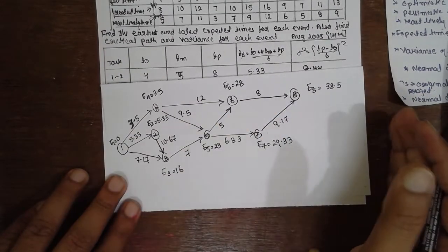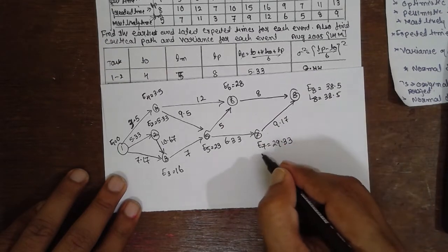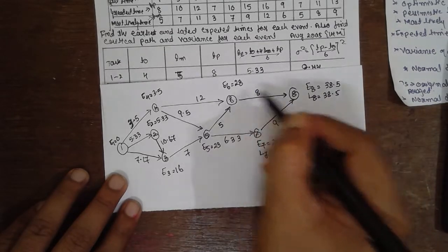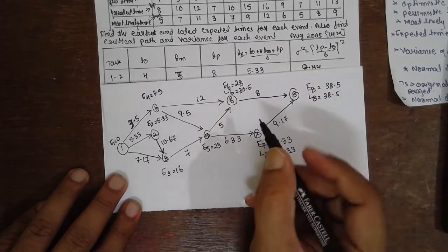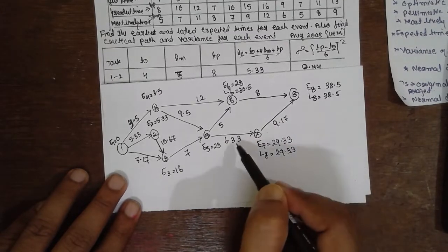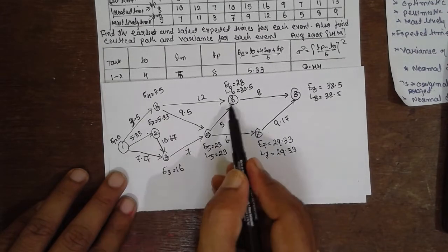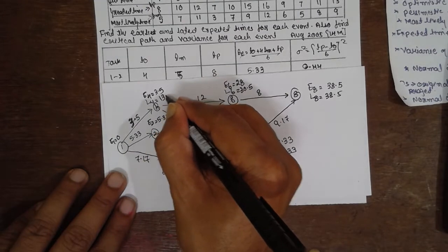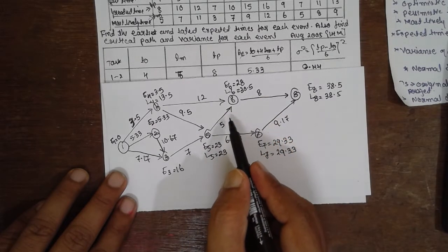When moving from right to left (backward pass), select the smaller values. L8 = 38.5. L7 = 29.33. L6: 38.5 - 8 = 30.5. At the junction for L5, select the smallest: 30.5 or 29.33 - 6.33 = 23. So L5 = 23. L4: 30.5 - 12 = 13.5.